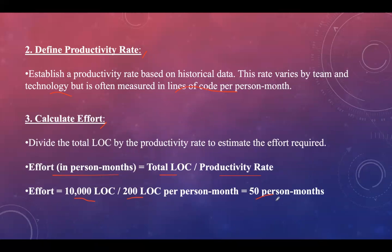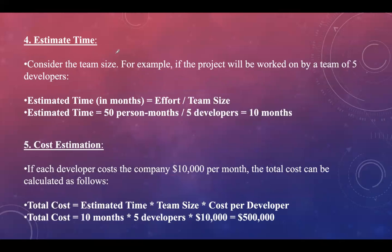Step four is to estimate time. If the project will be worked on by a team of 5 developers, the estimated time in months is calculated using the formula: effort divided by team size. Effort is 50 person-months divided by 5 developers equals 10 months. So 5 developers can complete the task in 10 months, whereas a single person would take 50 months.